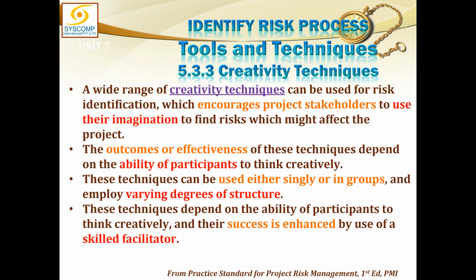Then there are the creativity techniques that are for the future. A wide range of creativity techniques can be used for risk identification, which encourage project stakeholders to use their imagination, thinking out of the box, to find risks which might affect the project. The outcomes of these techniques depend on the ability of the participant to think creatively. These techniques can be used either singly or in groups and employ varying degrees of structure.